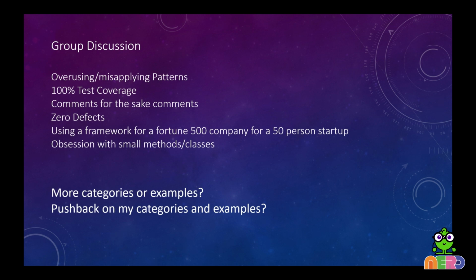But yeah, technical debt is another thing where you can chase. That gets down to that bug thing, the same sort of thing. Some things are obscure. Just as a side note, one of the places I worked at had what I thought was a really good way of evaluating bugs and whether or not they should be fixed. They had basically a graph with 2 axes. One axis was severity of the outcome, from a typo on the screen to crashing the system, and on the other axis was frequency, how often somebody is going to see it.